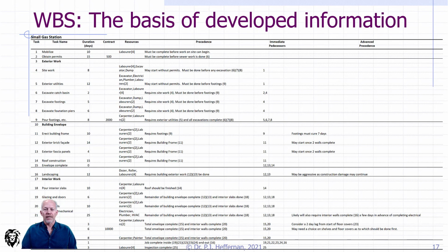Sometimes when we get ahead of ourselves, we start to impose constraints that don't actually logically exist, but they did in our mind when we were looking at it. So that's one of the reasons why I like Excel. Keep in mind that you can copy and paste this into the table in Microsoft Project and it'll build everything. So you're not losing any work. It's just a choice of keeping yourself a little bit isolated from the imposition of the schedule.